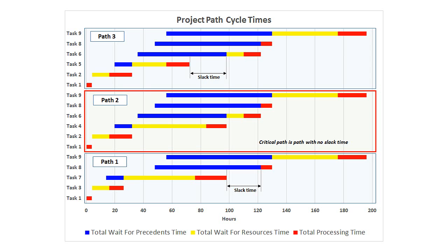And we can see that in this diagram, for this particular simulation run, we had slack time in path 3 and in path 1. So for this particular simulation run, path 2 was the critical path. And if we look here, we jump up at the end of each task. We will intersect when we move vertically. We will go into yellow or red color. We won't see blue. There will be no blue.